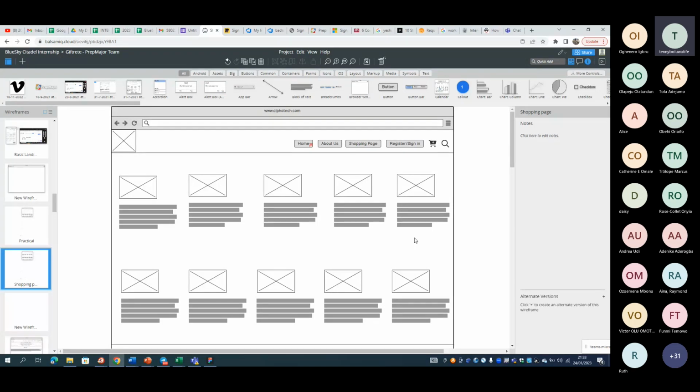As you are interpreting your requirement, and I don't know how you did your team charter, if you agreed as a team that every story must have a wireframe, so we cannot accept that story as done from the team's point of view to a BA, then every one of your stories has to have a wireframe, every single one of them. So as you write your user story, you have to design your wireframe.